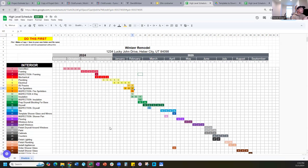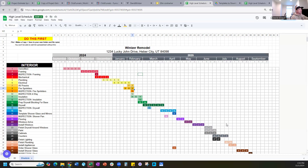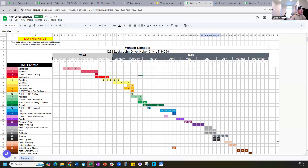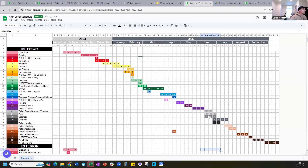There's no other real scorecard in construction other than the schedule and the budget. A great thing about schedules is you should start tracking your historical data — how long it took to build a house, complete a remodel, or do a demolition. The best way to support this is through photographs: daily logs, weekly logs, recording everything happening on the job site, because in two years you'll forget what happened. Your historical schedule data tells you when you scheduled to start versus when you actually started.